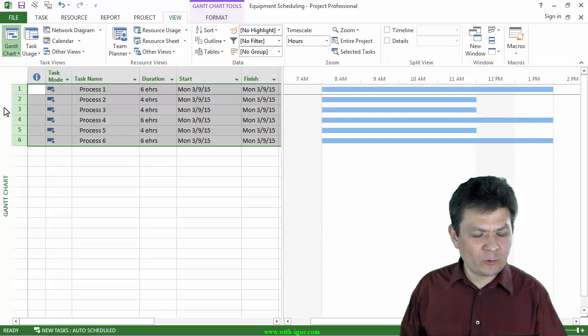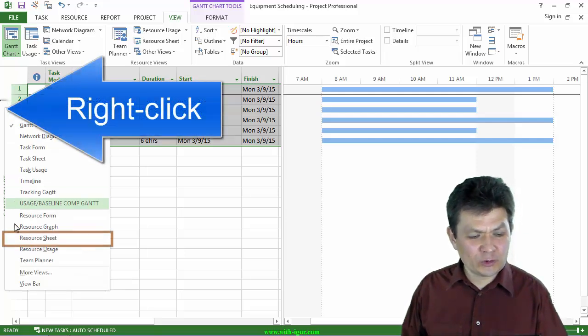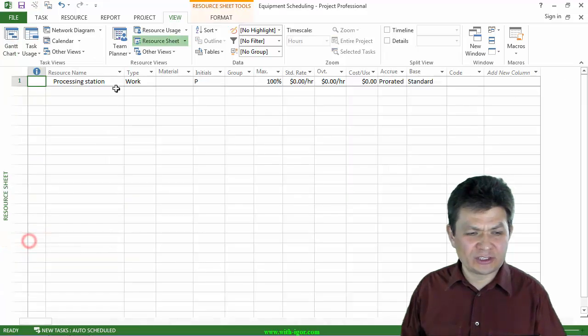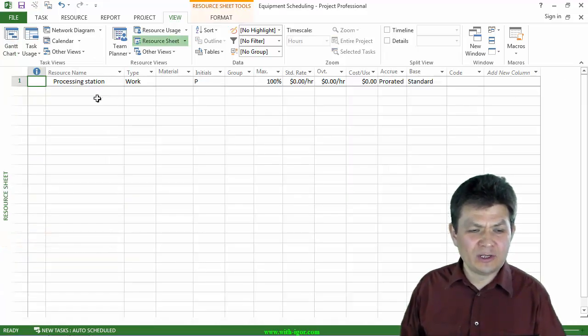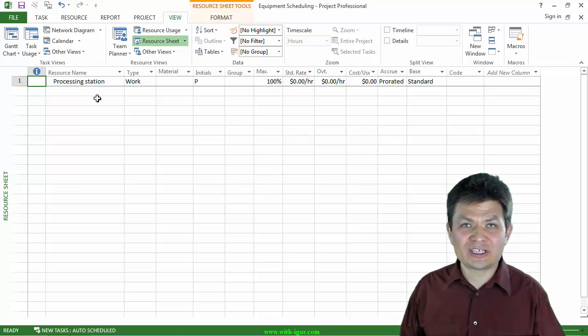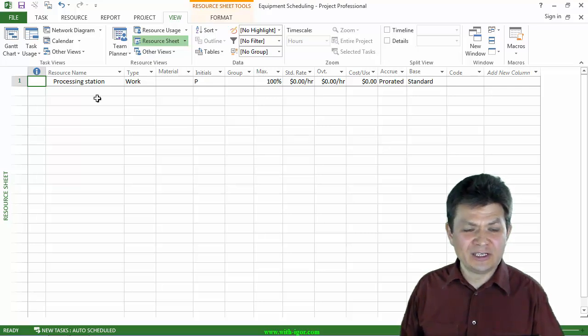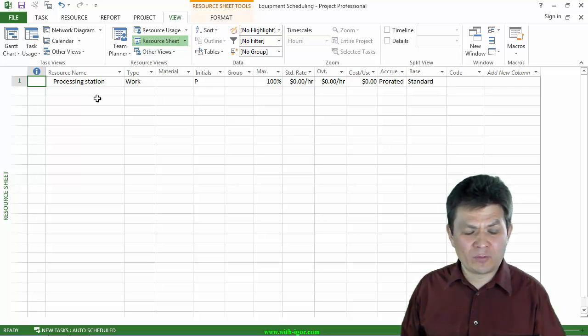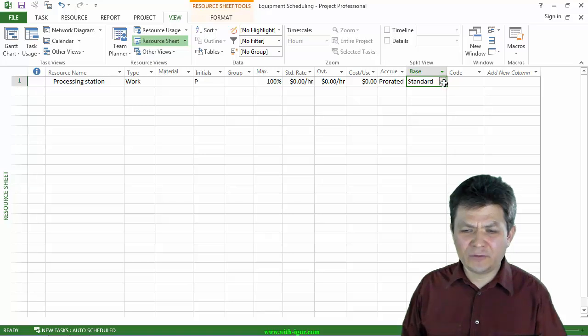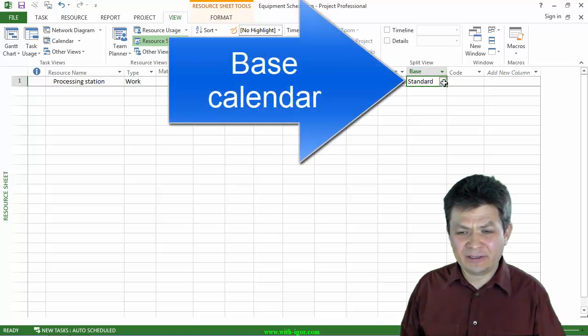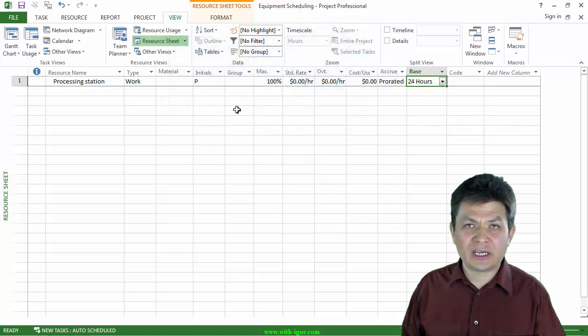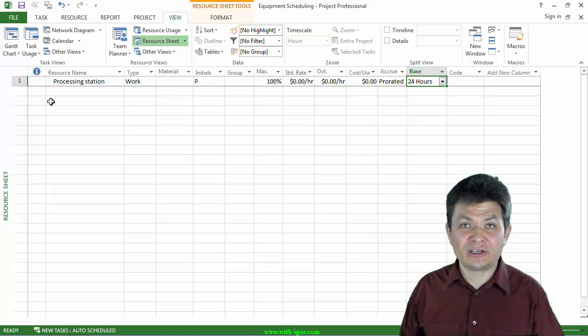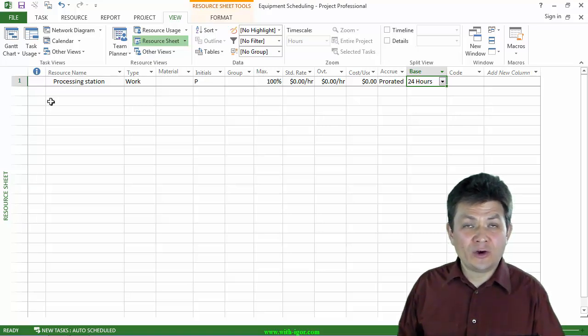Now let me go quickly to the resource sheet and see what I have in resources. They have a single resource. I called it processing station and that is the processing station that will do the processing, will run all of those tasks which need to be started by a human but run by the processing station. This resource, there's only one thing I would like to change here. Instead of the base calendar standard, I'm going to select the 24 hours calendar for that resource. Because the processing station can work 24 hours a day.